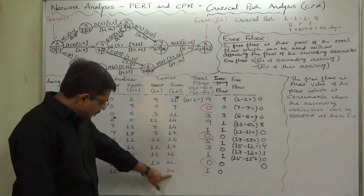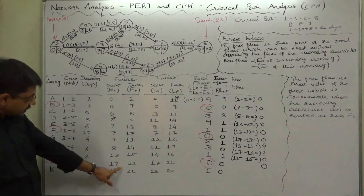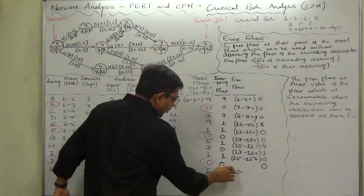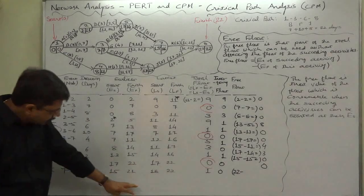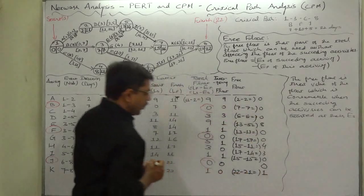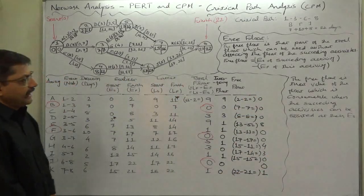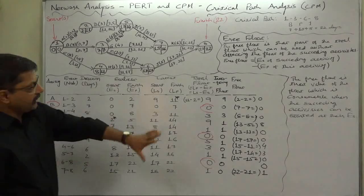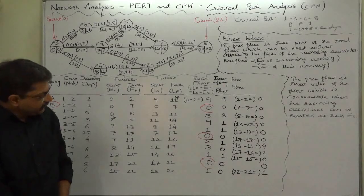For activity K, it also has no succeeding activity. The project is completed by virtue of J's completion time at 22 days, and K's earliest finish time is 21. So 22 minus 21 equals 1. These are the amounts of time by which we can delay each respective activity without affecting the floats of their succeeding activities — and this kind of float is known as free float.